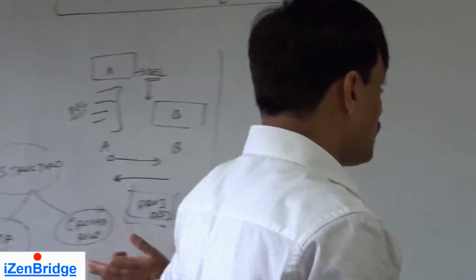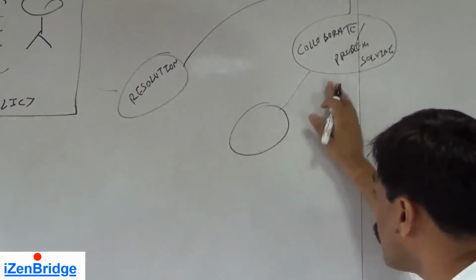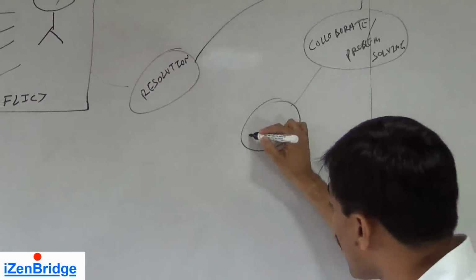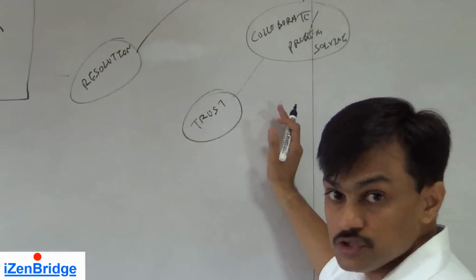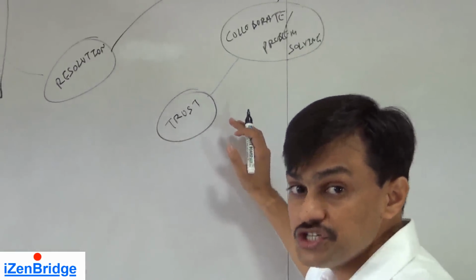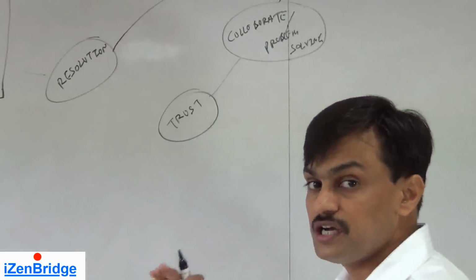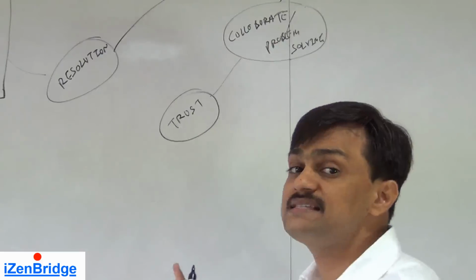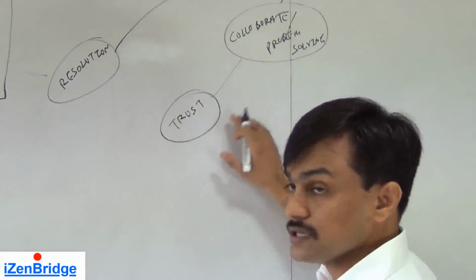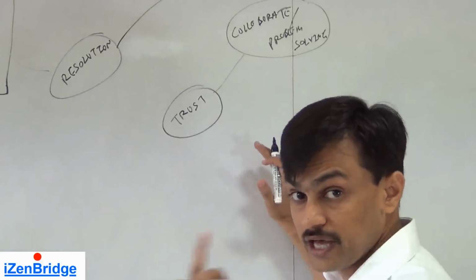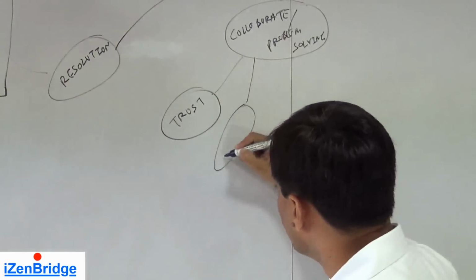So as visible in the example, the problem solving or collaborative technique requires trust among the parties. Team A and team B should trust each other, then only they can look into the problem. If they don't have trust, if team B thinks that team A is unnecessarily delaying the deliverable, then this conflict management cannot happen using collaboration. It will usually take more time.